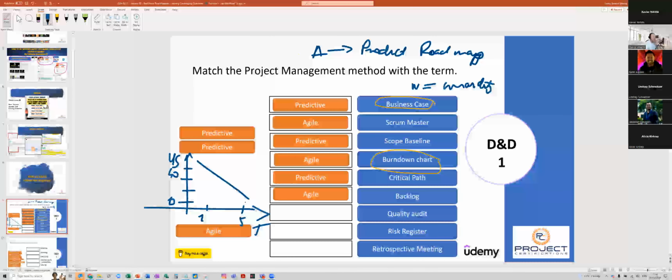Now, the goal is that we're reaching somewhat zero here, and then the reality is that we all start here. If you are below the line, then you are behind. If you are above the line, you are ahead. And in some cases, if you're going straight, that means there is no work which has been done. So that's, I would say, in terms of the reading of it. So it's not a huge rocket science. It can be easily explained.